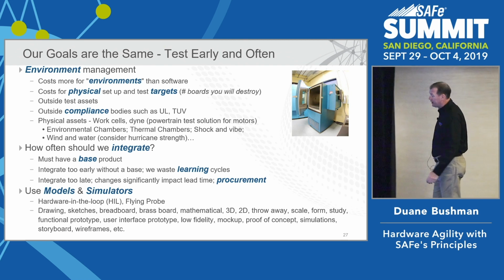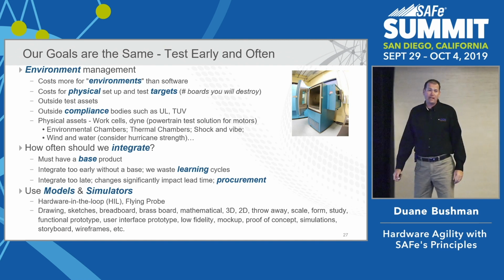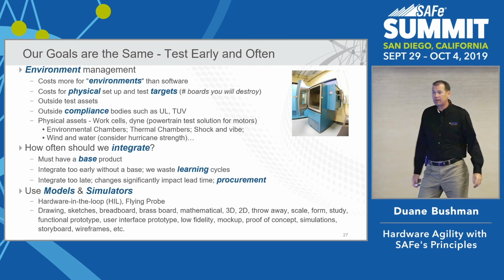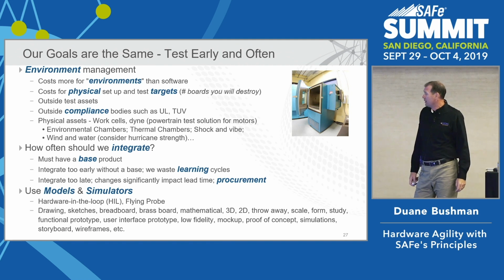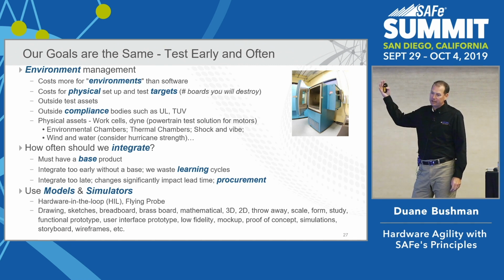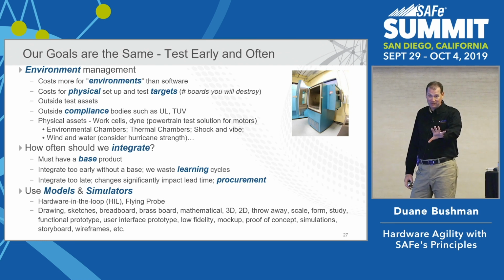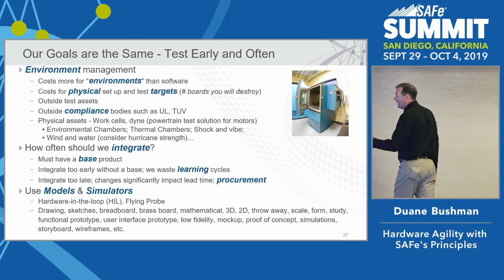How often should we integrate? Well, we've got to have a base product. This is a pretty common question. If we integrate too early, we waste some of those learning cycles, especially if we're starting to talk about where we are doing any kind of destruction of a physical asset, right? Or potential destruction. If we integrate too late, then we wait.